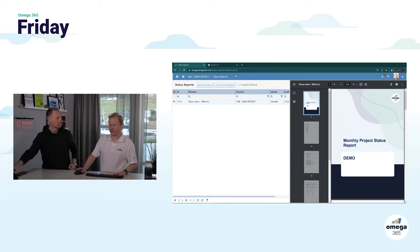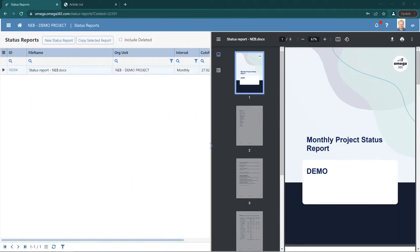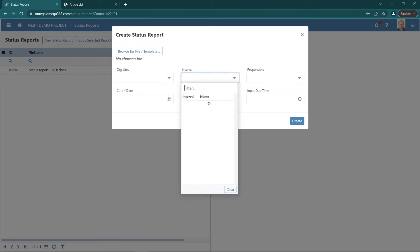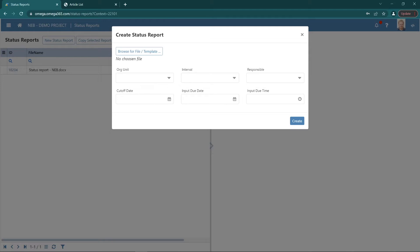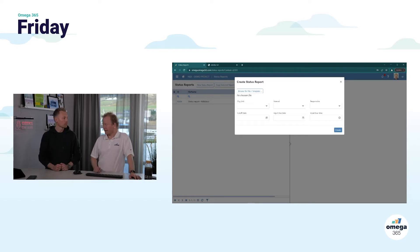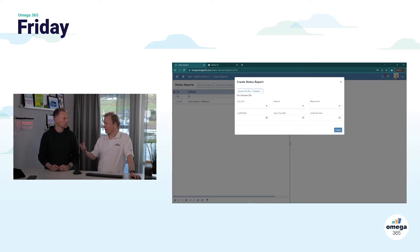So I have status reports here — I have a prepared status report. On the right-hand side you will see the preview. If I want to make a new status report, I can do that from here: I say which unit it belongs to, how often it's to be produced, who's responsible, the cutoff date, the input due date and time. When we're collecting input from all the different contributors — because in a project we're going to have the status report — it's typically based on inputs from various people: the cost controller, risk manager, the project manager, with traditional text inputs saying something about how it's all going. That will appear on their front page so they know they have an action to prepare their input.